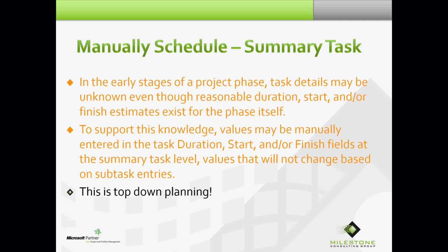That is top-down planning. Okay, so again, maybe we open a template and we collapse it to outline level 1 where our phases are. And we just begin scratching in some high-level information at the phase level because we're a long ways away from working the subtask that ultimately we want to roll up to that phase level. That is top-down planning.